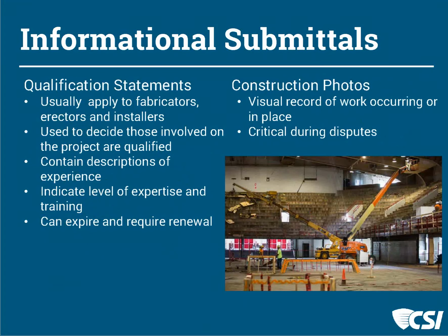So let's use the coordination drawings, for example. We are not looking at these. We're not putting a stamp on them and sending them back. Our involvement in a set of coordination drawings is we require it, and that's it. The rest of it is the responsibility of the group of constructors. We know it's important to do because all work needs to be coordinated.